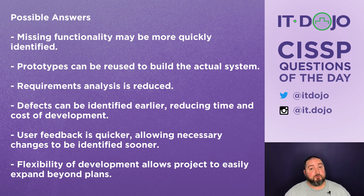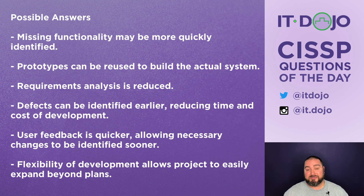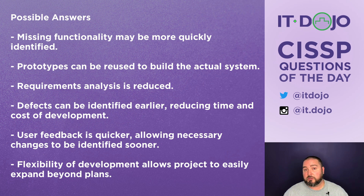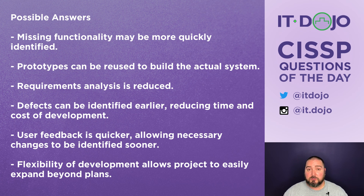There are lots of benefits to prototyping. One is that you get feedback from the user much earlier in the process. It also allows you to identify defects in the software earlier, reducing the time and cost associated with fixing things. If you wait until the software is completely finished before making changes, those change orders on completed code are significantly more expensive in both money and time.